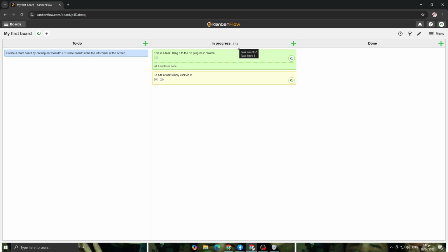Example: in the In Progress column, limit it to 3 tasks. As you see right here, this prevents multitasking overload, half-finished work, or maybe burnout. Focus on finishing tasks before starting new ones, and prioritize visually. Ways to do this: add priority levels like high and medium, or use colors or tags. Put urgent tasks at the top.